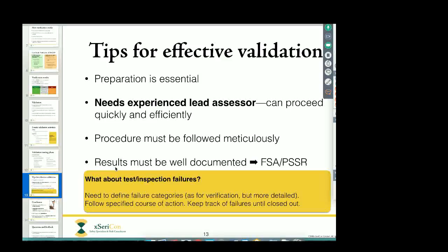Ideally, have a full-time scribe who's dedicated to this. That scribe is going to get very bored, because most of the time they'll have nothing to write. But the trouble is that when they do have, there'll be a flurry of activity. There'll suddenly be 10 results come in very short time. The scribe's got to be able to quickly capture all of that in the checklist without wasting the time of the chairman or someone else or the lead assessor to write those results down.